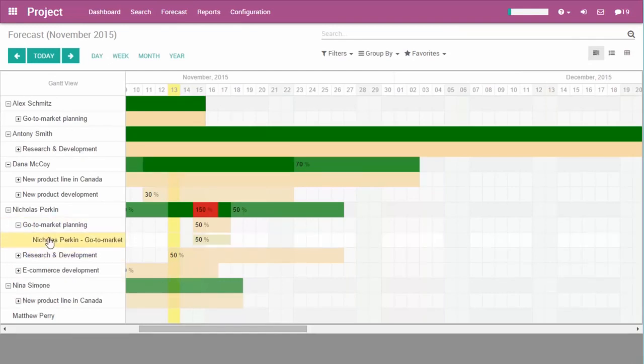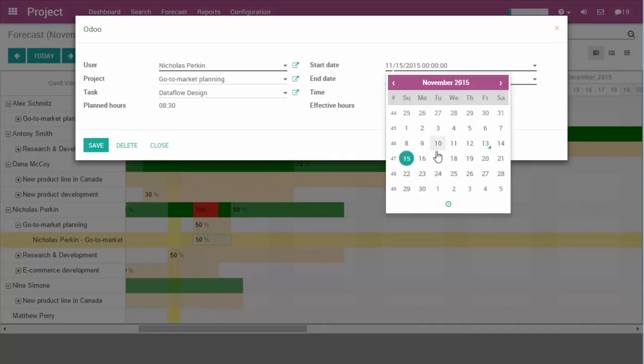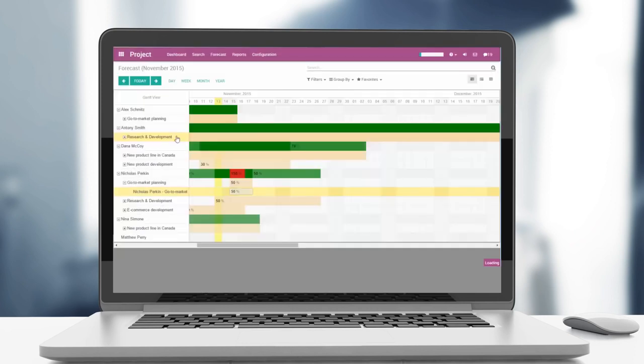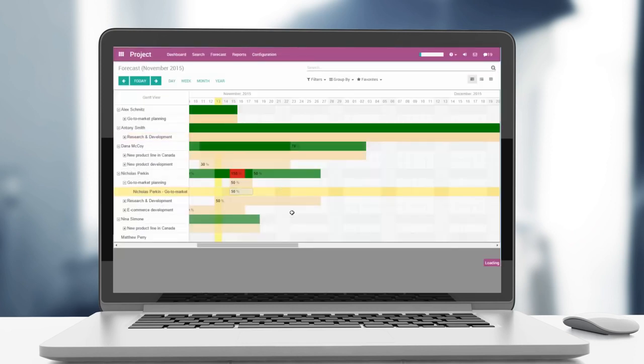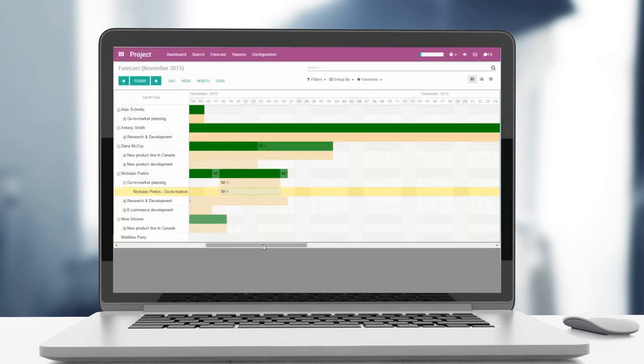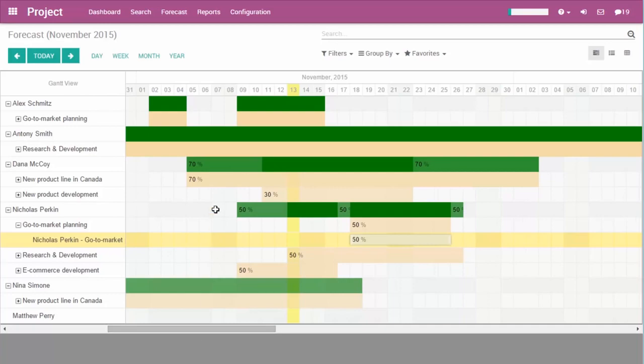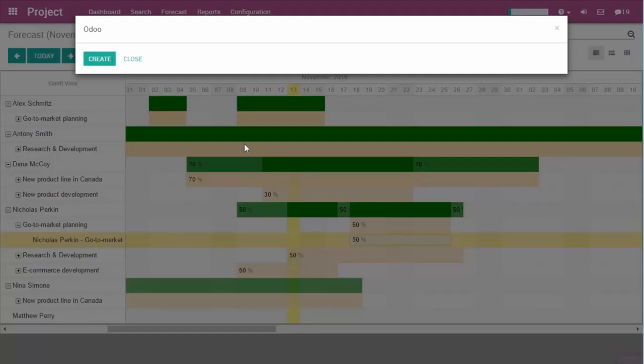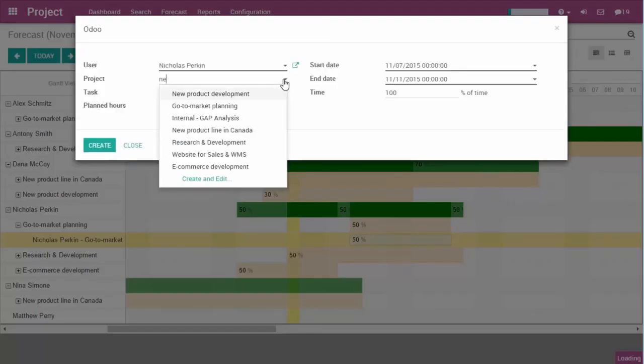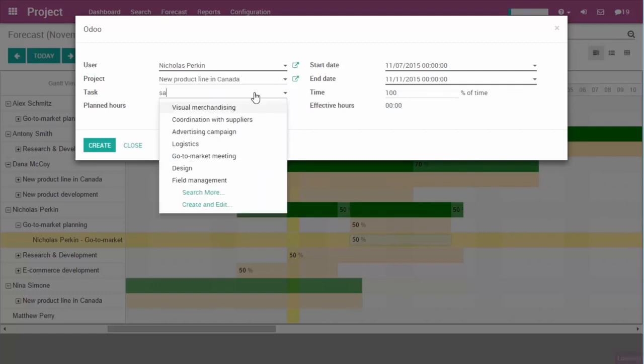Another great feature in Odoo projects is the forecast tool. When it is activated, I can plan resources per project and the workload. Therefore, the time allocation for other projects is much easier. For this project, I have to train members of the sales team. It will require 50% of my time until the end of the week.